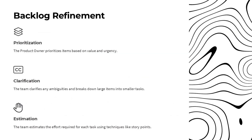Backlog refinement is a crucial process where we work together to ensure our product backlog is ready for the next sprint. The product owner starts by prioritizing the backlog items based on their value to the business and how urgently they need to be addressed. As a team, we clarify any ambiguities in the backlog items and break down larger items into smaller, more manageable tasks. Finally, we estimate the effort required for each task using techniques like story points to get a sense of relative complexity, resulting in a clear, prioritized, and well-understood backlog going into the next sprint.